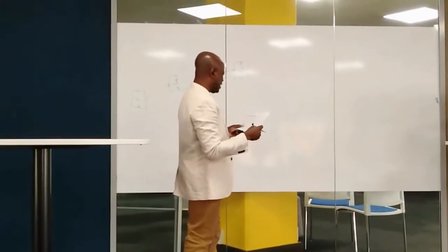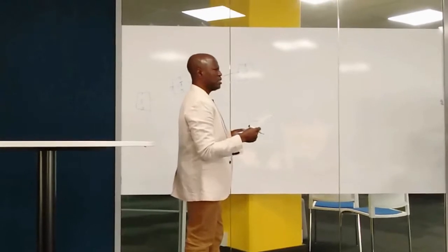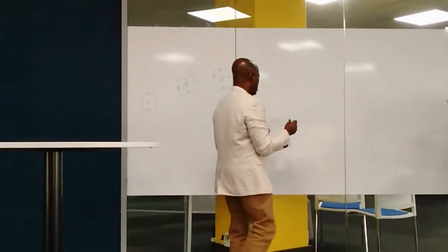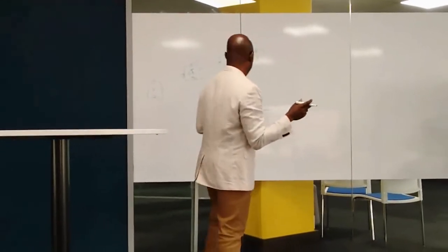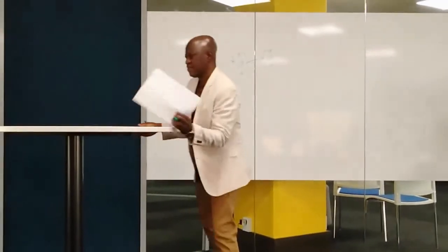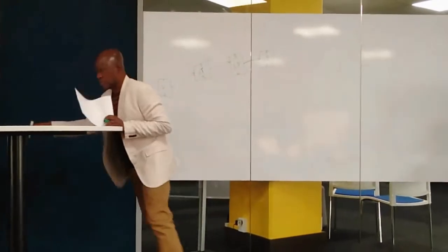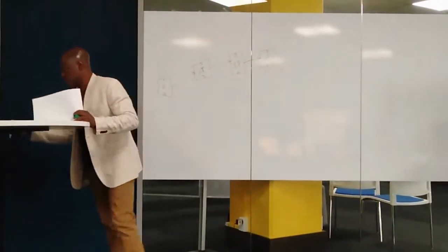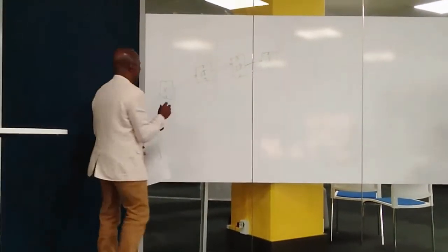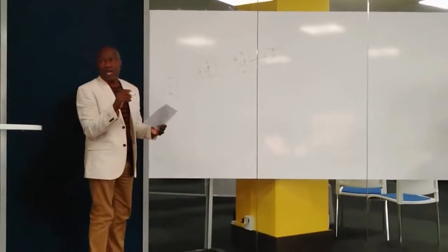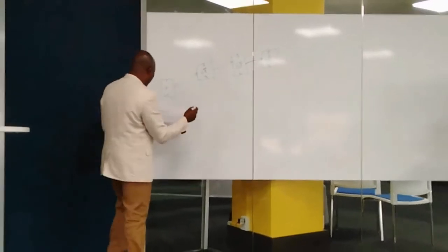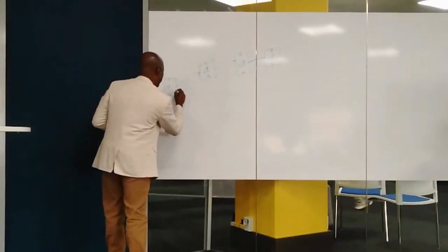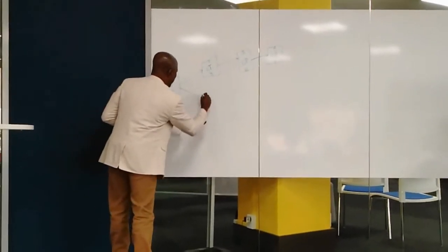What is the next activity there? Venue selection. That's number 5, right? Yeah, it's 5. Dependent on what? Dependent on number 1. We come back to 1 here again. This is dependent on 1. We draw our line from here because it's taken off from 1. We put it here.